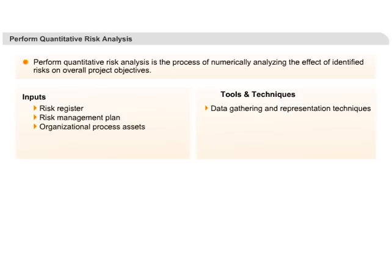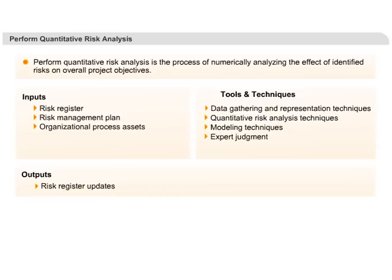Let me emphasise that quantitative risk analysis should only be done when it's worth doing it. Usually, large multi-year projects may require quantitative risk analysis. The output of this process is the quantified list of prioritised risks. Along with this, sometimes the amount of contingency reserve in terms of time and cost is also calculated as part of this process.